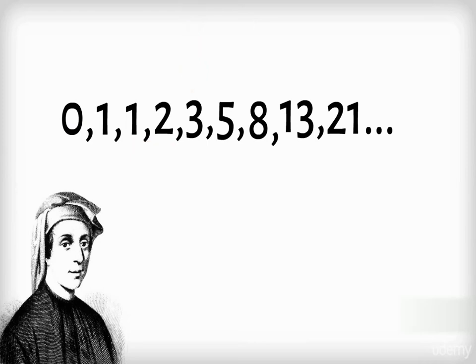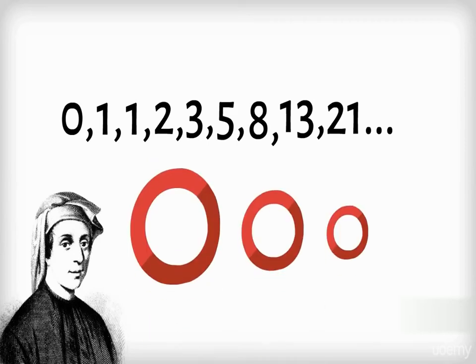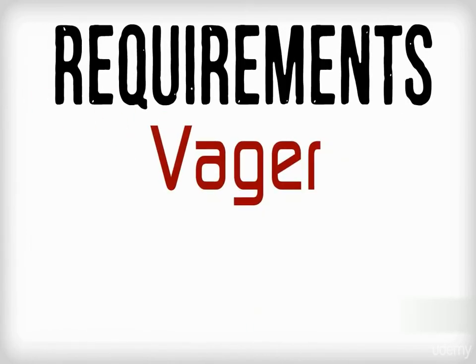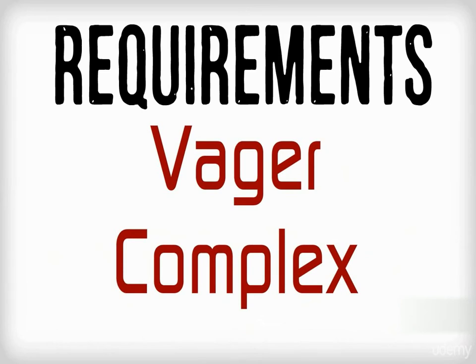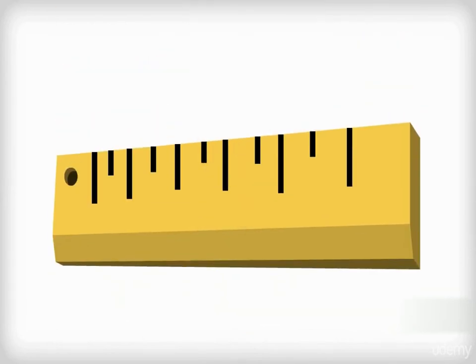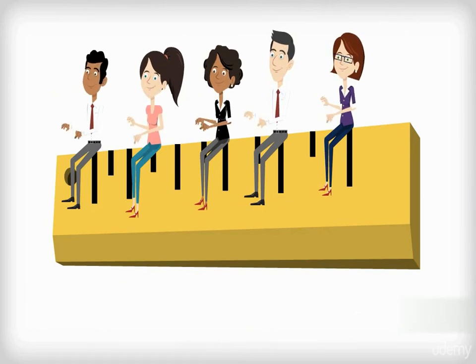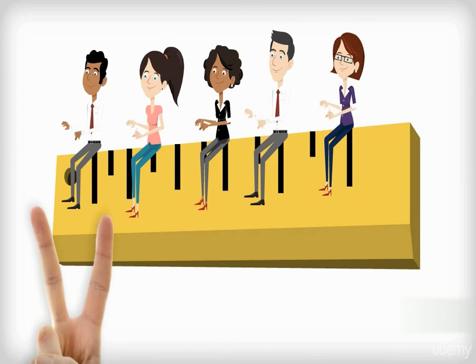In short, studies have shown that these particular numbers marry well with the way we compare relative sizes, and therefore they became popular for estimating. Further to this, it is thought that as requirements become vaguer or more complex to translate into reality, it is more difficult to estimate the amount of effort involved in solving the problem. Therefore, the higher numbers in the sequence roughly double instead of following the Fibonacci sequence.